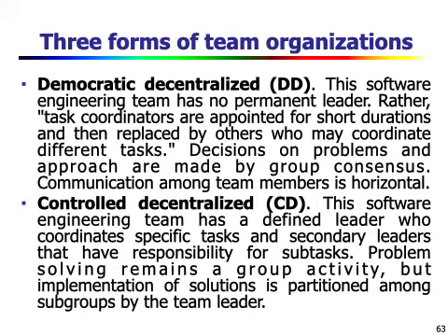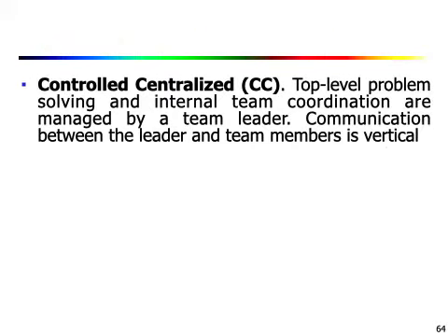It is controlled but decentralized. Controlled centralized means top-level problem solving and internal team coordination are managed by a team leader. Communication between the leader and the team members is vertical, not horizontal. So that is controlled centralized team organization.